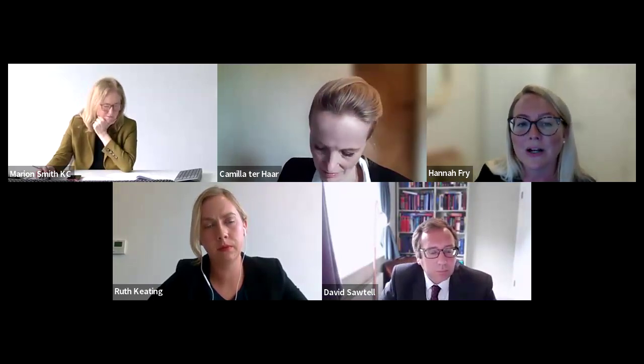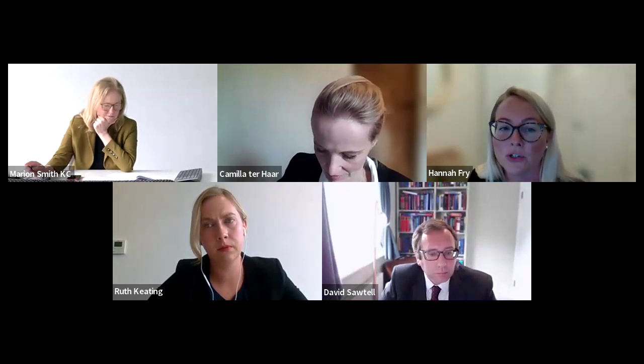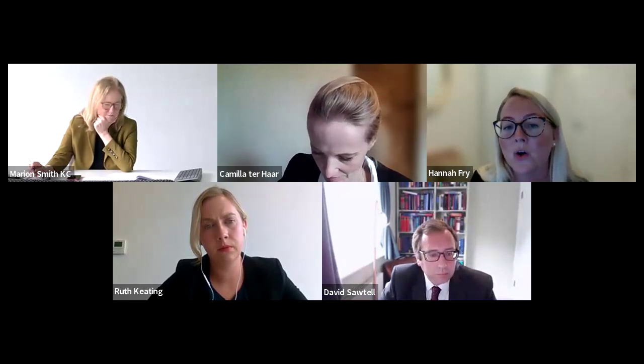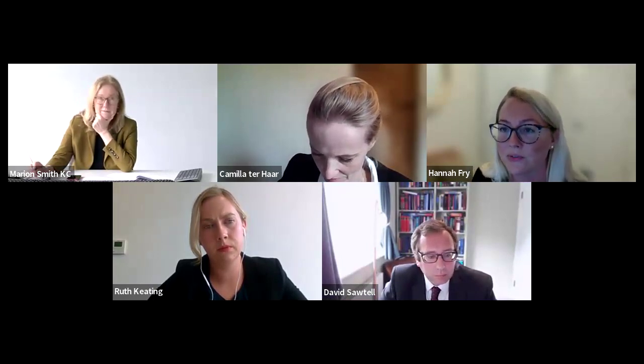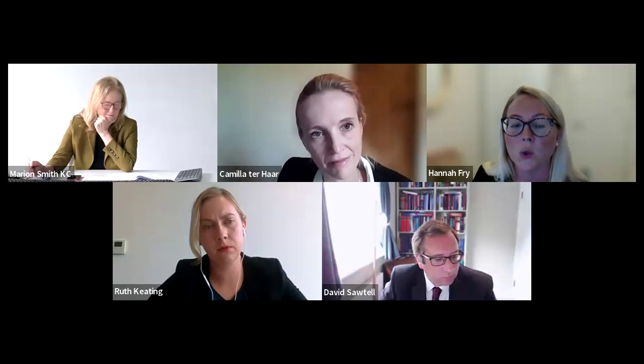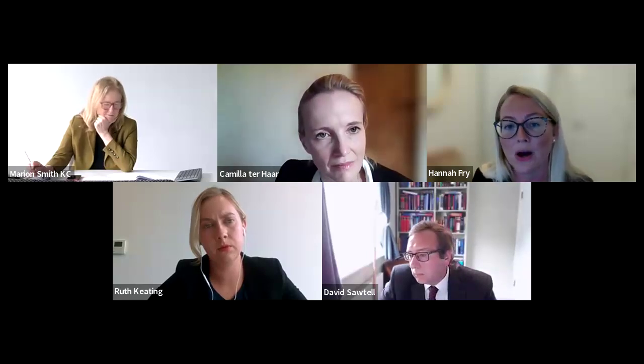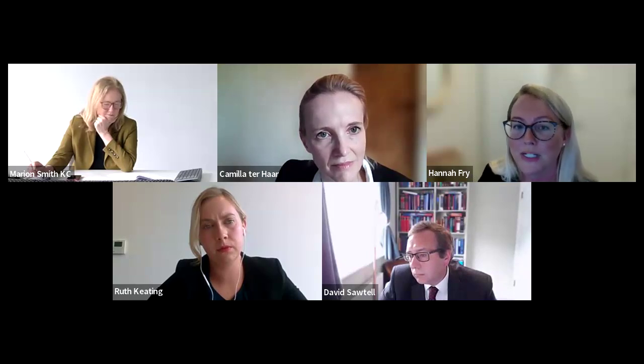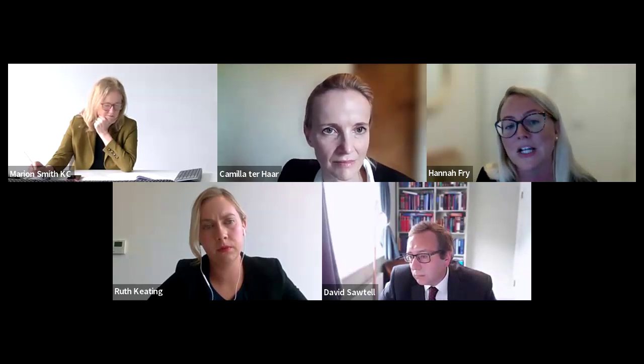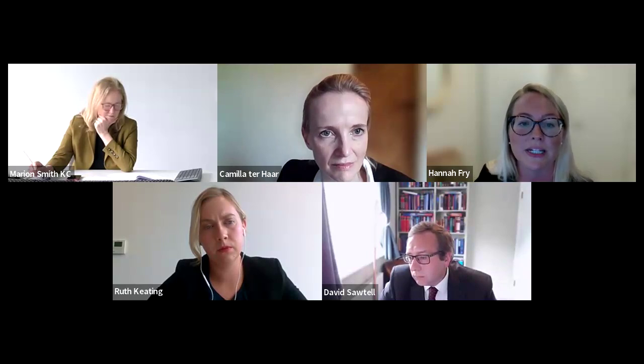So now a company becomes insolvent where first, a moratorium pursuant to Part A1 of the Insolvency Act comes into force with respect to it, or secondly, where an order is made sanctioning a compromise or arrangement pursuant to Part 26A of the Companies Act 2006 with respect to it.